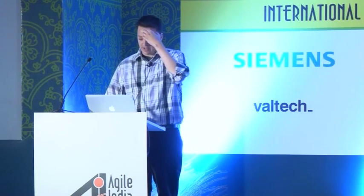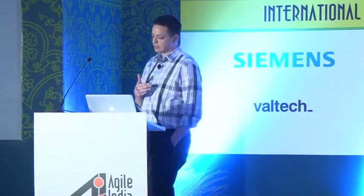Another view you might use if you're following SAFe is a release train planning board. This is a great example of a view you can set up in Rally to help plan your release train. On the right-hand side is our iteration planning board — we can see multiple iterations for the release train for the upcoming PSI. We can drag and drop items into different sprints, create a blueprint for the PSI, look at the features committed on the left-hand side and the stories beneath them, and see the overall vision or theme for the PSI in the upper left-hand corner.